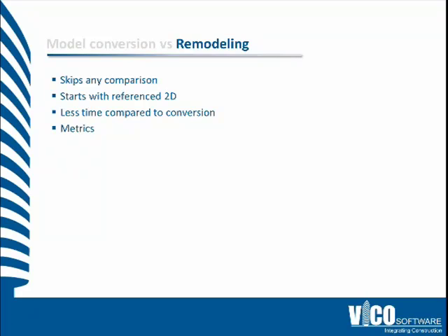in the virtual model and coming up with not just the clash problems, so not just a clash detection list of intersecting elements. It's also an opportunity to spot where missing dimensions on the drawings are, and inconsistent or uncoordinated schedule data to the 2D data, and we can really do a full constructability report.